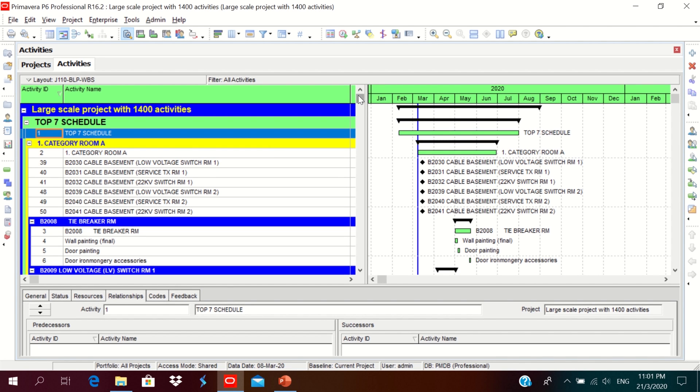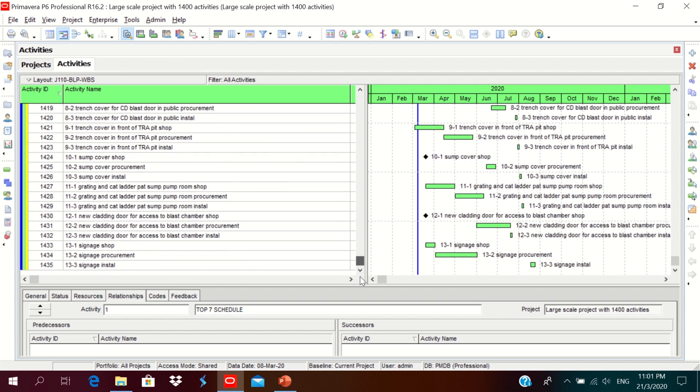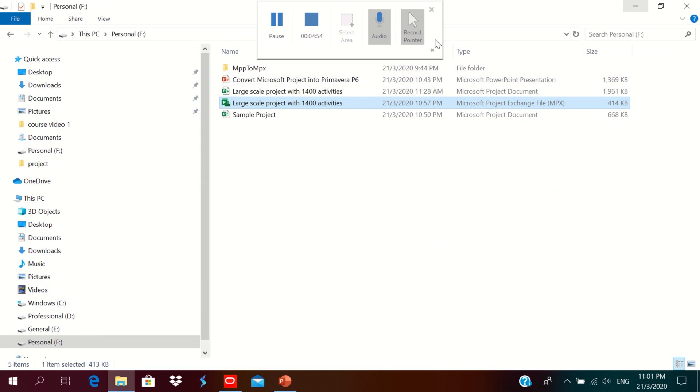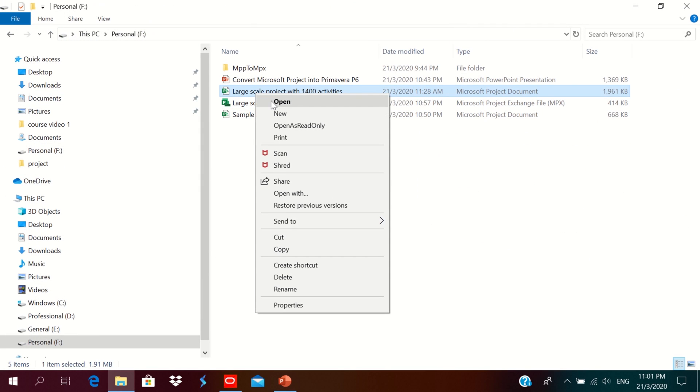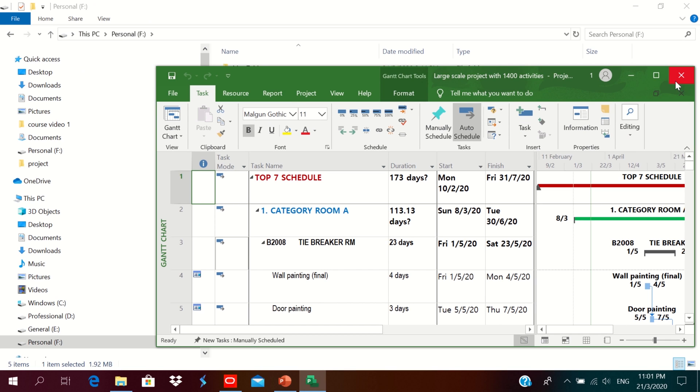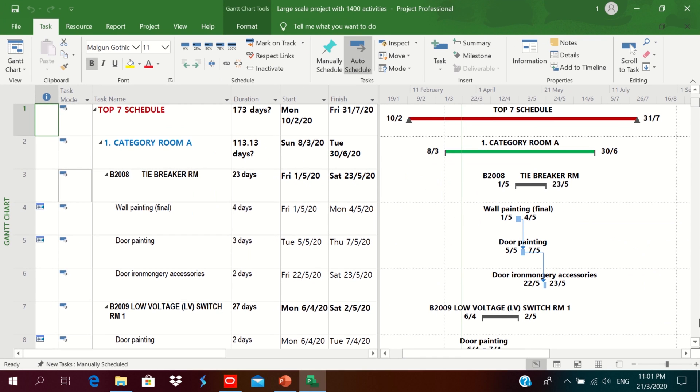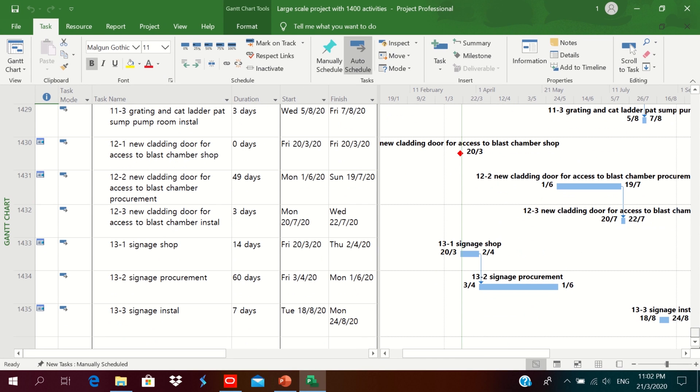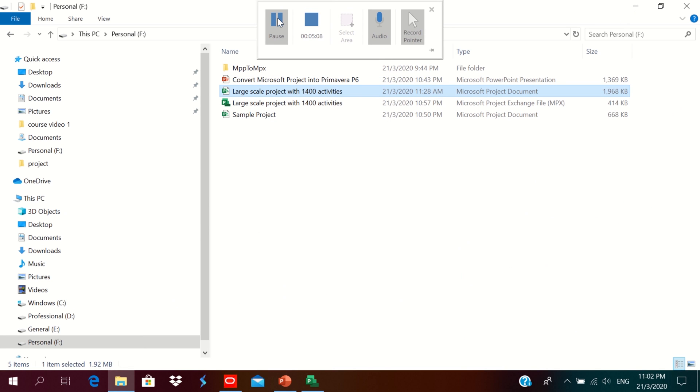You can compare the project. It is having one three one four three five activities. Go to the MS Project, open it. You could see this one is also having one four three five activities. Then this is how we can convert.